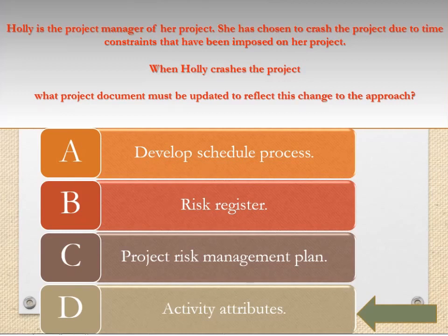Activity attributes are used for schedule development and for ordering, selecting, and sorting the planned scheduled activities in a number of ways within reports. In project document updates, activity attributes are updated to include any revised resource requirements and other revisions generated by the develop schedule process.